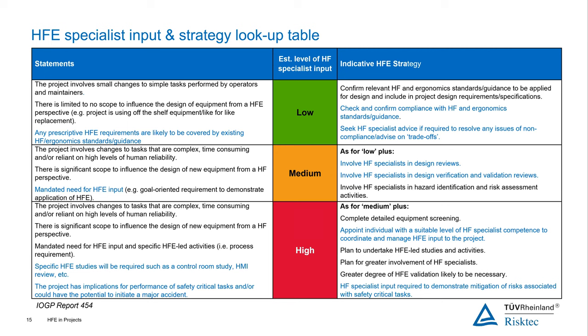And what you need to do there is have your HF specialist involved in the design reviews, but also you probably need to appoint someone specifically to manage the HFE input to that project. So you'd have a HFE manager, and you need to have specialist input then into that demonstration that the risks associated with safety critical tasks are mitigated.